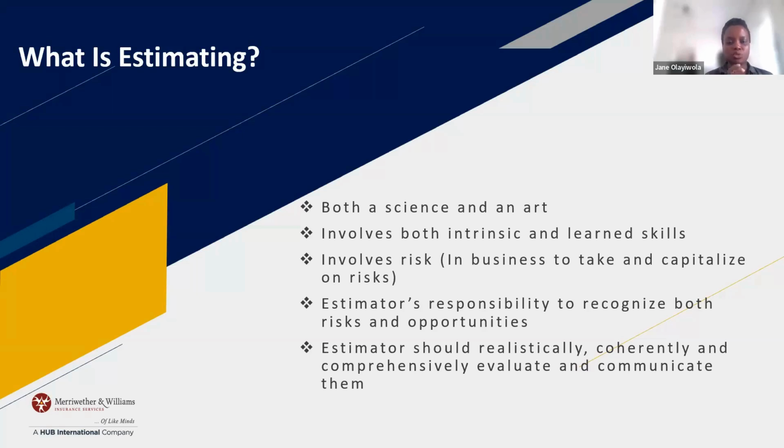Another major source of risk could be weather delays, right? Once you do start construction, but it's also an estimator's job to anticipate that and give yourself some room, some contingencies in case of those risks.